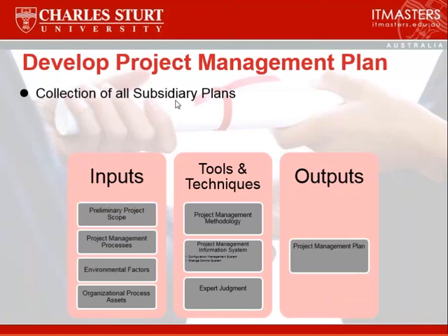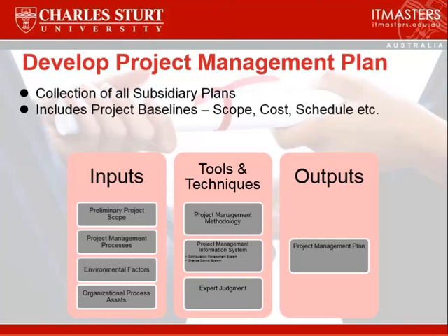The plan, which is part and parcel of planning, in fact, it culminates after you need to plan how you're going to tackle all your planning, and then the culmination of all the planning is a collection of all the baselines, which essentially says what is the scope of the project, what's the cost, what's the schedule, and how are we going to manage all these things as we go through the rest of the project. What are the inputs to this particular process?